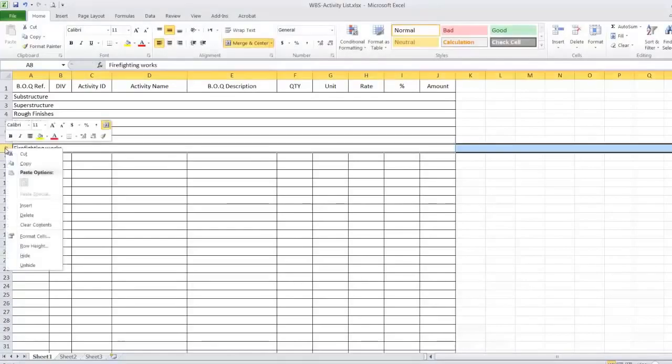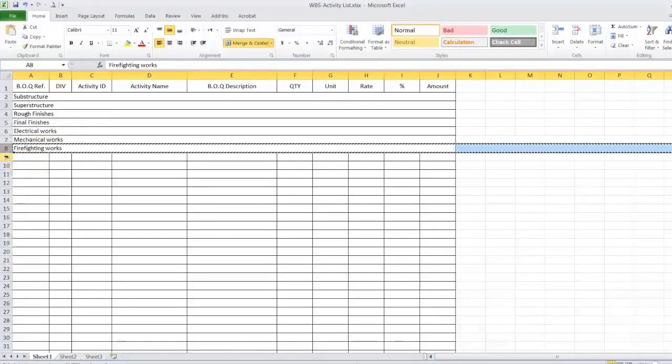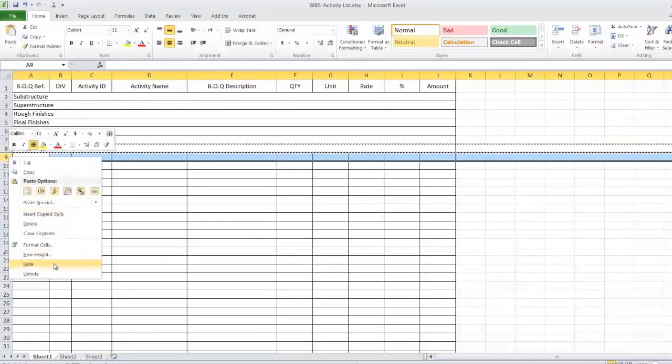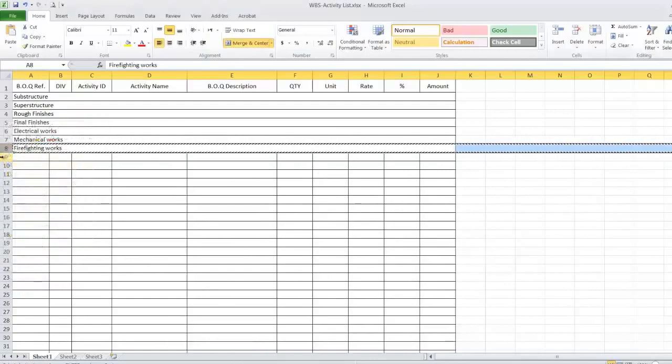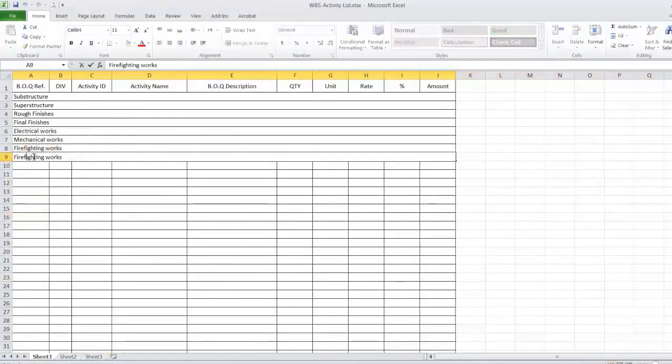this will be our WBS work breakdown structure, and of course it varies from project to project. So you have to check what is the content of your projects, what are the elements you have, then you'll add them. Add the conveying system, which is elevator and escalator.